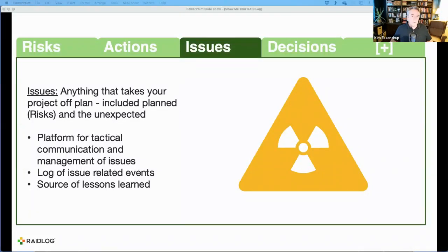This is also important from a knowledge management perspective, because what I've done in the past as well is to say, all right, I'm going to go do this project. Show me all the risk logs for previous projects that were similar to this. Let me see how they responded to those risks, because first of all, maybe some of those risks I haven't even thought of. Maybe some I have, and they've already figured out a way to get around that risk so it didn't turn into an issue. And let me see all the risks that actually turned into an issue, so maybe I can find some way to try to avoid that. All really key in learning from past projects to improve future projects.